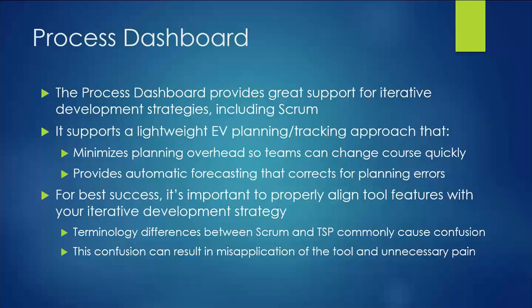One of the examples that I like to share is that the very first time that I used this earned value planning and tracking technique, I was working on a project for the Air Force. We had a release plan that spanned about an 8-month period, and 3 weeks into our 8-month period, we could already tell that we weren't going to finish on time. 3 weeks into an 8-month release plan. And that early warning and that early forecasting gave us the ability to immediately start looking at contingency plans, or going back and working with the customer and figuring out what we could change in order to make sure that we would meet their needs.